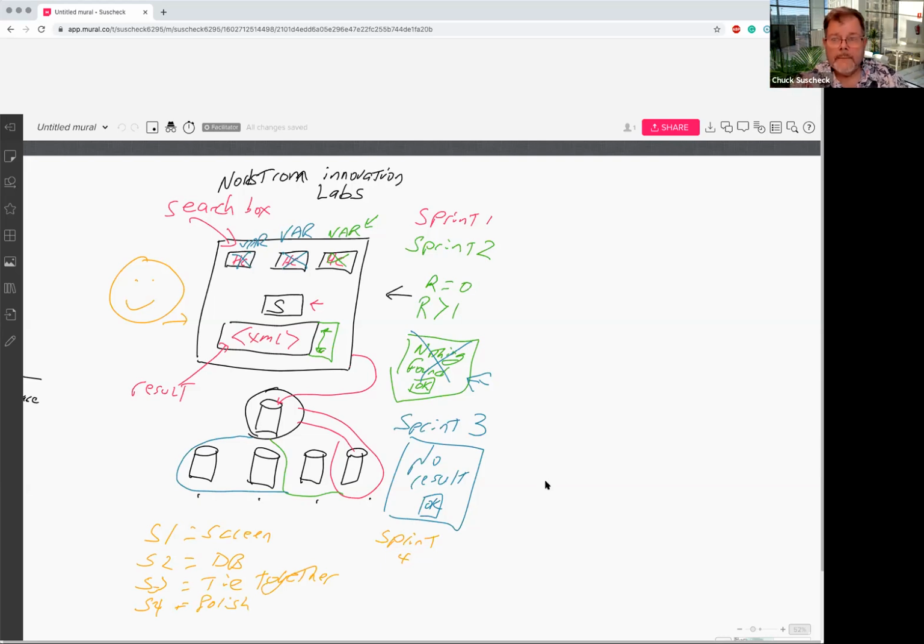But by doing it this way, sprint 1, sprint 2, and sprint 3, all of those touched every level of the architecture. So each sprint, she learned something more about the architecture, evolved it, learned more about each layer, evolved it. If she would have done it just one sprint with a screen and the next one doing database, anything she learned from doing the screen would only marginally inform her on how to do the database. So she was mitigating the risk of making sure that something was inspectable every time, using what they call a tracer bullet through the architecture, evolving the product here.